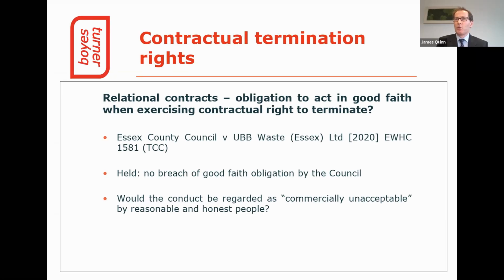The judge found that there had been no breach of the obligation of good faith by the council. He ruled that whether a party has not acted in good faith is an objective test, and that whilst dishonest conduct would be a breach of the duty of good faith, dishonesty was not of itself a necessary ingredient of an allegation of breach. His view was that the question is whether the conduct would be regarded as commercially unacceptable by reasonable and honest people.